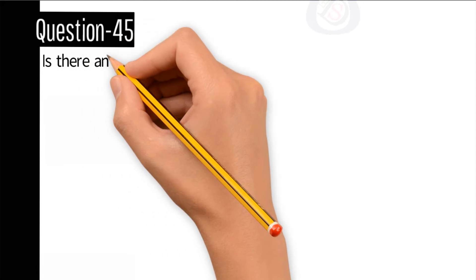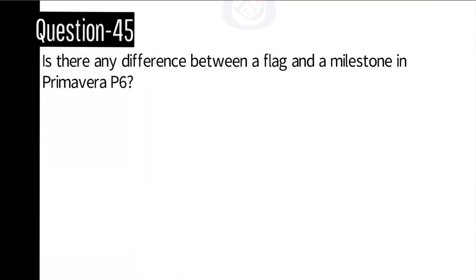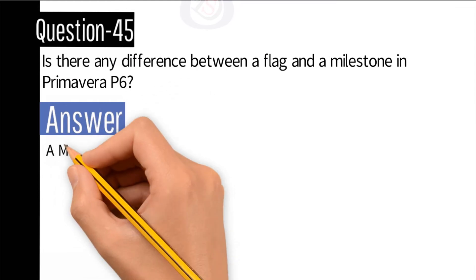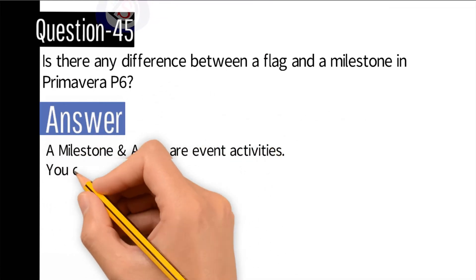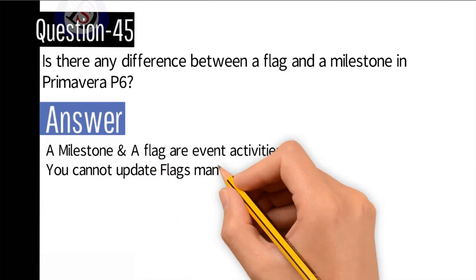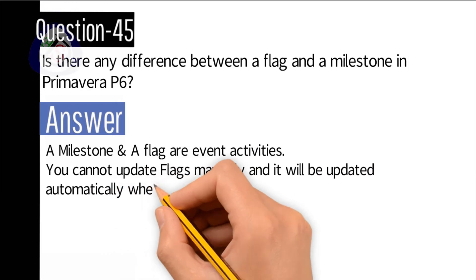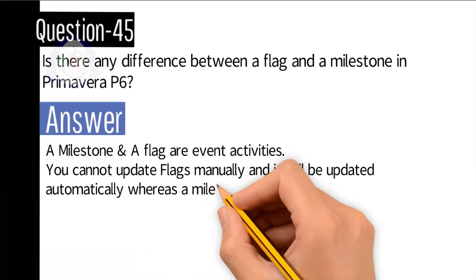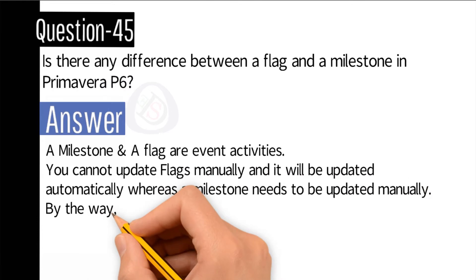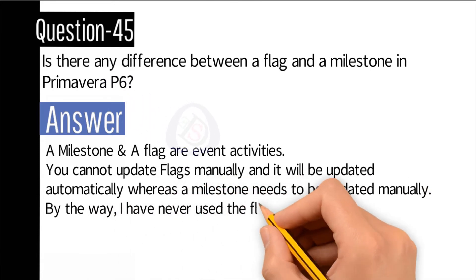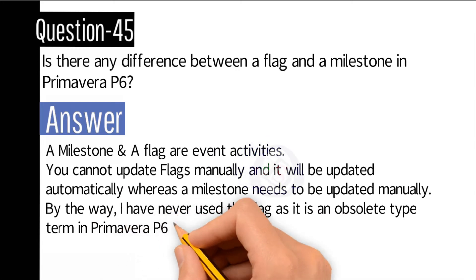Question number 45: Is there any difference between a flag and a milestone in Primavera P6? A milestone and a flag are both event activities. You cannot update a flag manually — it is updated automatically — whereas a milestone needs to be updated manually. By the way, a flag is considered an obsolete term in Primavera P6 nowadays.